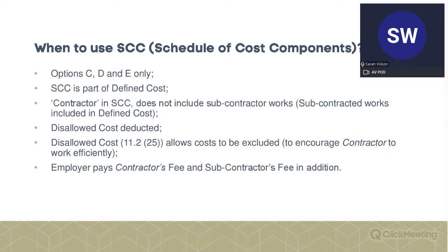So it's quite a neat way of doing it, as opposed to, of course, JCT, where it's either set out in the contract, but as far as variation work is concerned, for example, you end up having to claim rates based on either analogous rates within the contract or reasonable rates, and then you have to show that your overhead and profit is a reasonable sum.